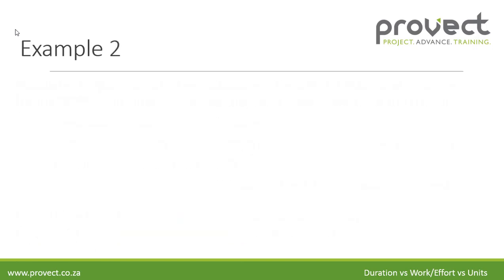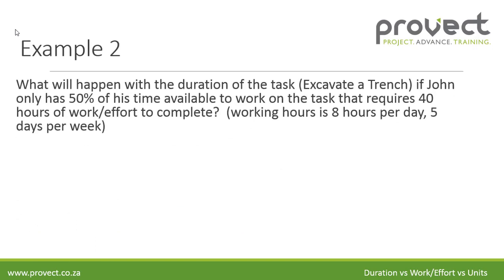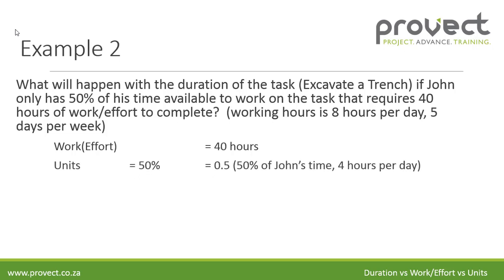Now let's look at example two. What will happen with the duration of the task to excavate the trench if John only has 50% of his time available to work on the task? The task still requires 40 hours of work effort to complete. The work is still 40 hours, but the unit is now 50%, which equals 0.5, so John will only be working four hours per day.